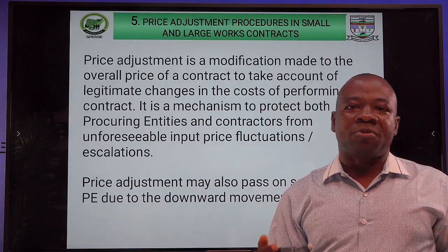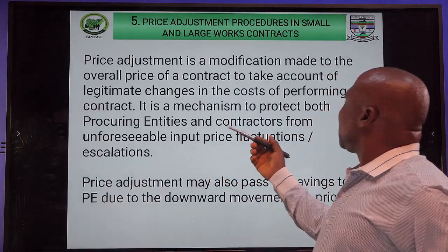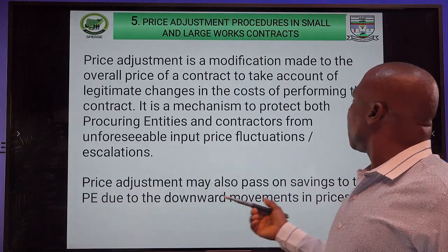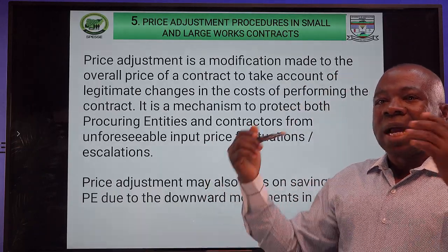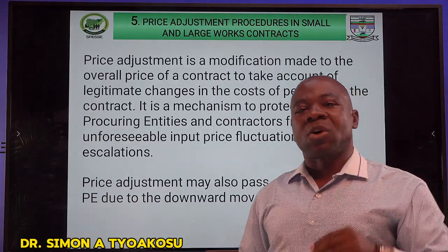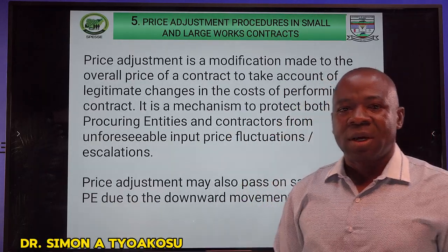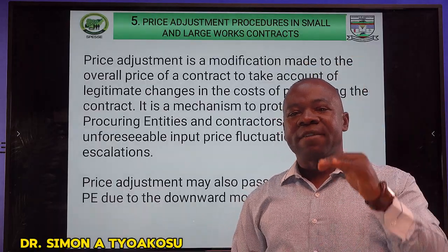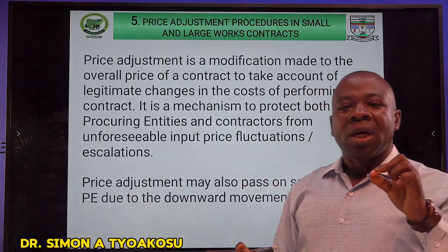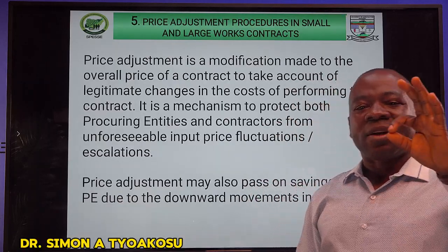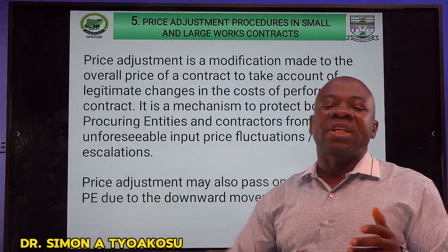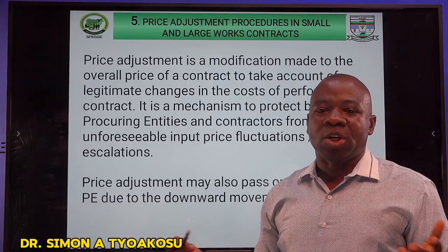Then the fifth aspect of our course, or this module, is to look at the price adjustment procedures in small and large construction works. Actually, even though as procurement officers you look at cost analysis and price estimates, at the end of the day, situations may arise that will make you see that whatever estimates you gave are no longer realistic, probably due to inflation, deflation, or whatever situation may have arisen from the economy.